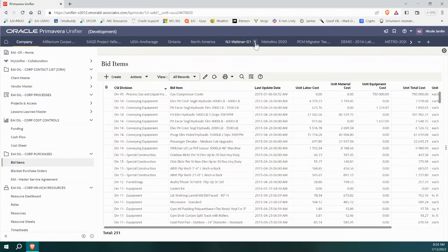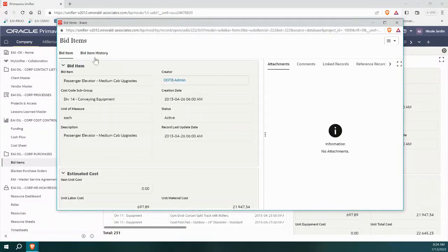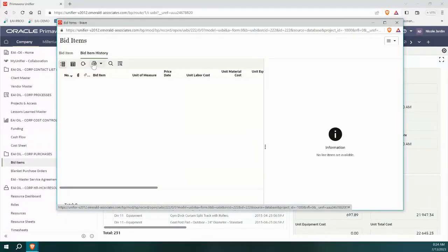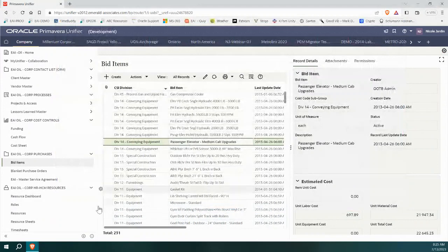Okay, so this is a master items list where we have split, let me open one of these up, where we have split the amount into, let's show you here, different components. So I've got a labor component, I've got equipment component, material, and unit cost. Okay, so you can create this tracking system however you wish, and then you start to award bid items against them. And this can be used on any project. Okay, so that's something that's quite handy to having at a master level.